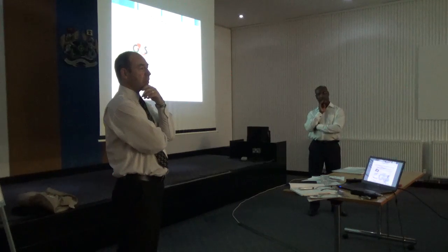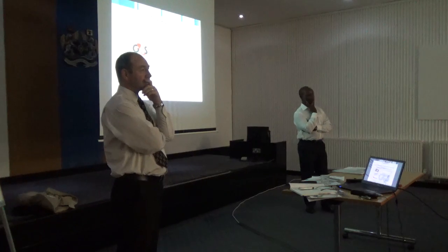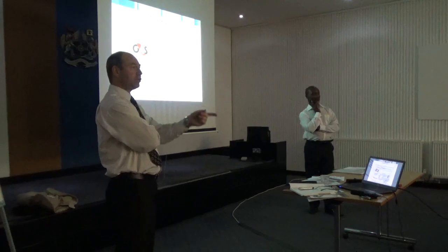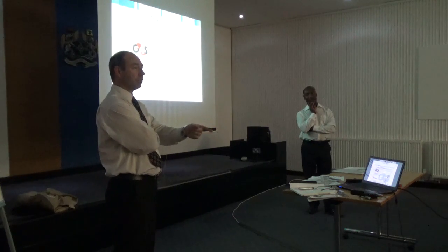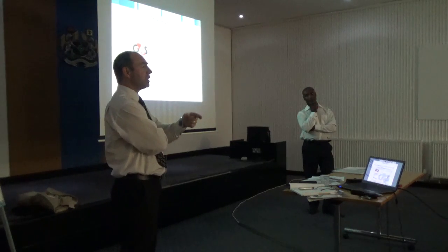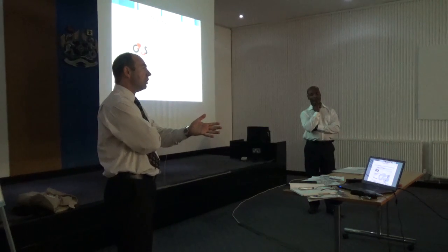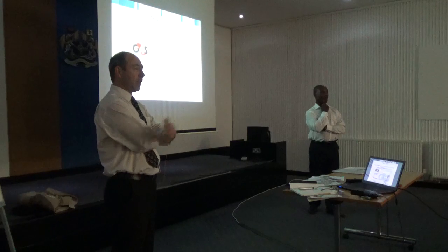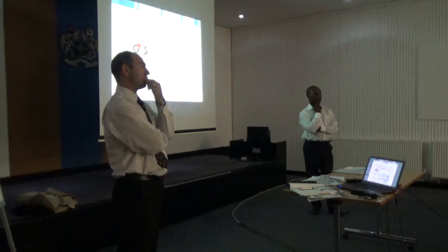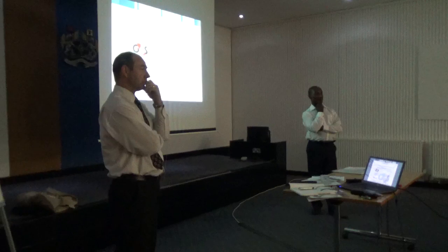Yeah, it's that wonderful phrase, equal or approved, isn't it? But in theory, who's that approved by? So if the designer's saying equal or approved, is it approved by the design consultant? Well, it depends on what the design consultant's engaged to do. If he's only engaged to take it up to a feasibility sketch scheme, then you're absolutely right. At that point, he stops, walks away with his fee, and the rest is now with the construction company. The problem is sometimes he's novated to the contract. In some instances, yes. Therefore, the incentive changes.